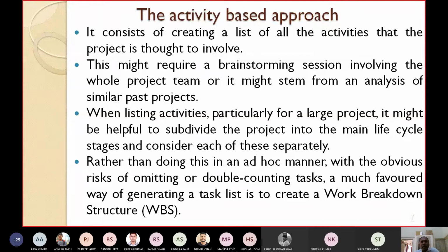This might require a brainstorming session. So identifying the activities using this approach requires a brainstorming session involving the whole project team, or it might stem from an analysis of similar past projects. If it is a new project, the whole project team may be involved to identify the activities. If it is a similar type of project that you have already done in the past, then this approach might originate from an analysis of those similar past projects.